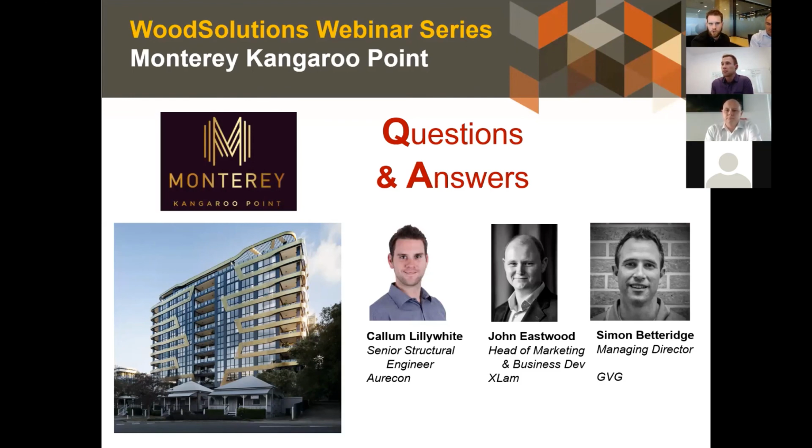I don't know if Simon or John, you want to have a bit of a skim through? I'll answer a couple of the ones that look like us. Heavy wet weather, we were lucky. We didn't have too much until recently, and it wasn't a Brisbane monsoon. We kept a buffer of 2 floors between where we were sheeting internally, and then we had a range of strategies. You might have seen the tape that tapes up the joins, and then we rolled out sheets of plastic, effectively tarpaulins, to protect, and had squeegees on site to get the labourers to push the water off. So it wasn't too much of a factor. We think we dealt with it pretty well, but we weren't really tested in that regard.